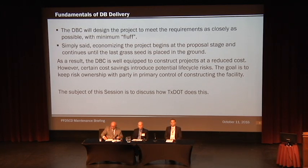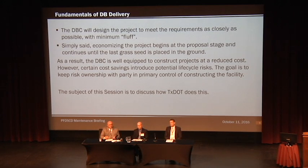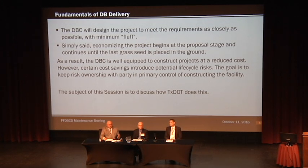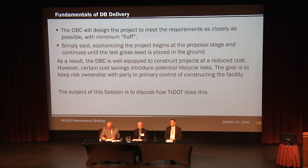The DBC will design the project to meet pretty much the contract requirements. He's not going to do any more — no extra fluff. He'll meet the contract, which is basically what we want. We just have to make sure that in our schematic we have what we want. Economizing the project begins at the proposal stage and continues all the way through design and construction. However, certain cost savings that the DBC implements could introduce some lifecycle risk costs. The goal in the DB delivery process is to make sure those risk costs stay where they should be, with the DB contractor accordingly.